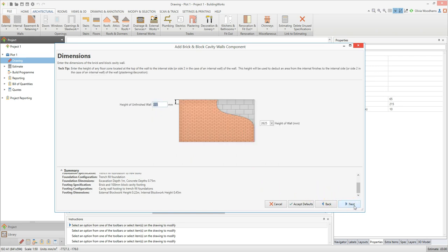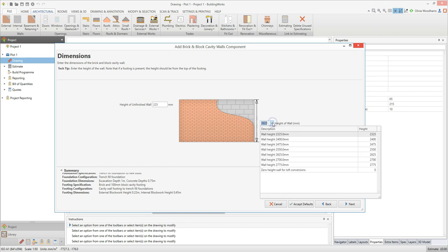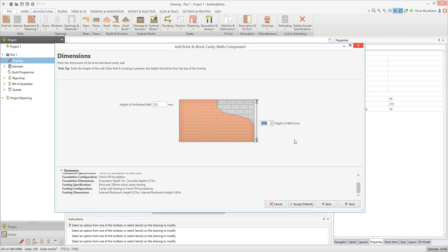Finally, you can tell BuildingWorks about the dimensions of the wall. First, enter the height of unfinished wall — in other words, the height of wall which is taken up by the floor above and doesn't require plastering and decoration on the internal side. Now select the wall height from the drop down box. Alternatively, you can type a wall height into the drop down box. Then click next.